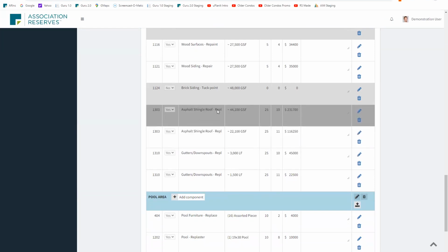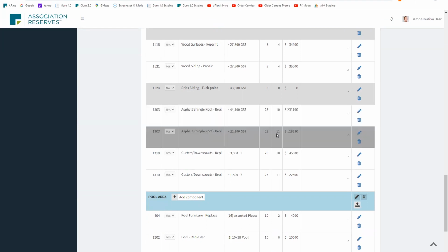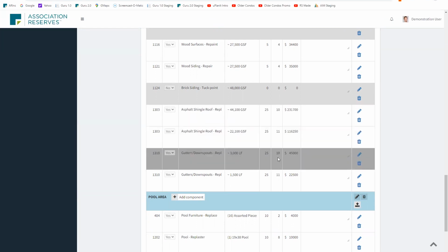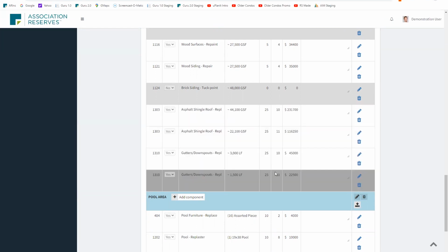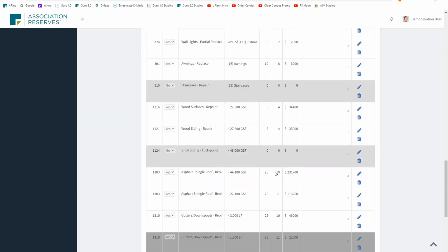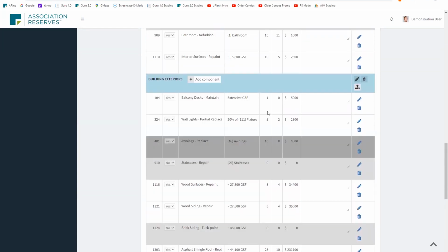And another example that we're talking about projects here. My recollection is this was a place with 6 buildings. So we're doing 4 of the buildings on this cycle and the last 2 buildings a year later. So phase 1 and phase 2 of the roofing and phase 1 and phase 2 of the gutters. So you don't have to do the entire thing at once. You can see what's appropriate. And then I just thought of one more thing.